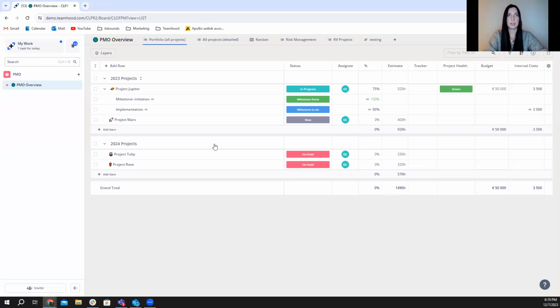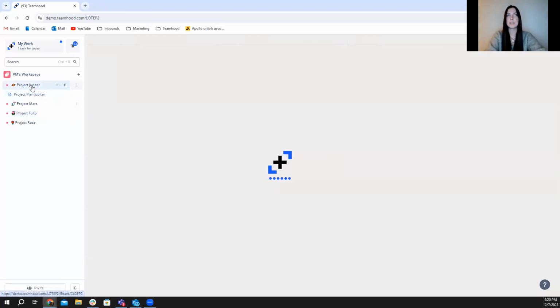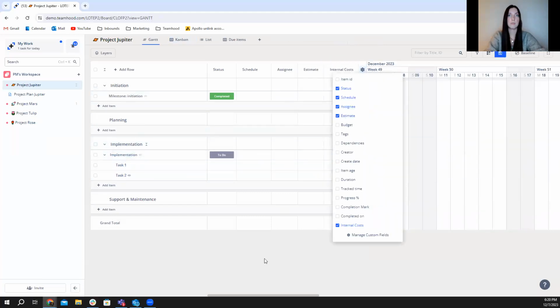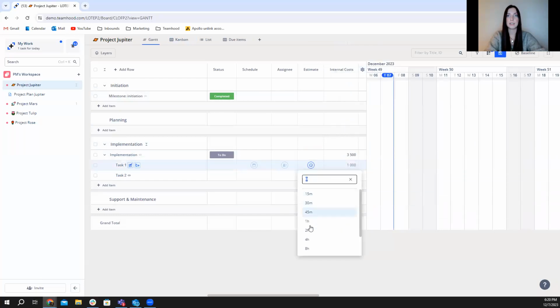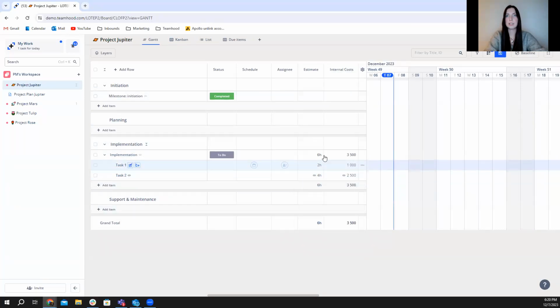Yeah, so if we're talking about estimated time adding from sub items to the parent item, it sometimes will not be visible. Let me just open another board. For example, in your Kanban board, we have task 1, task 2, and we can add the estimation. Just very quickly, we can estimate 2 hours and 4 hours. So the total estimation adds up over here in your Gantt chart.